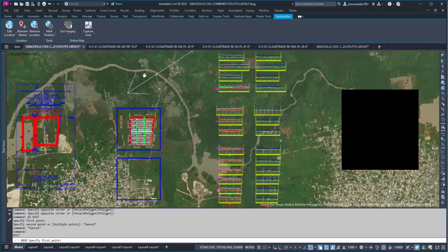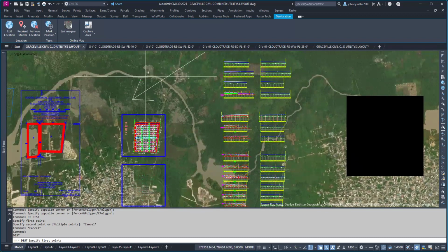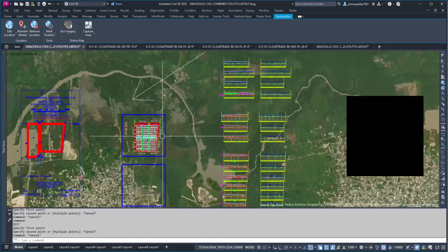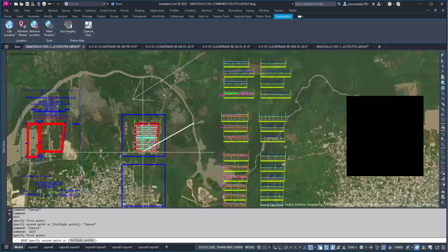For example, if our dredger is here, it will pump to this place. Then when it shifts to this place, we will pump to this place. The maximum distance to pump sand is around 1,200 meters.